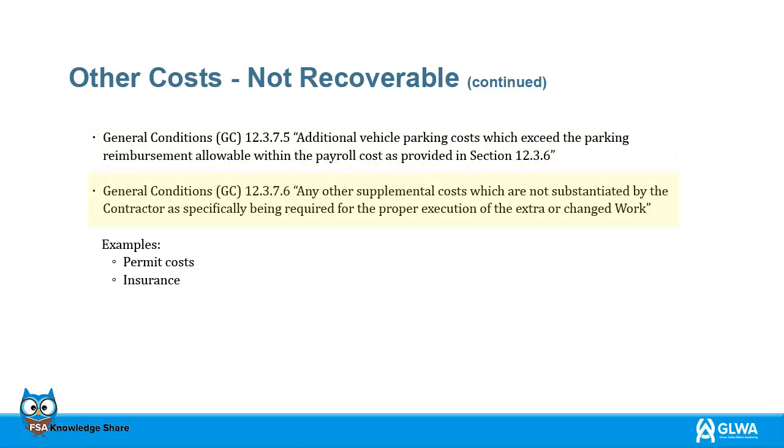General Conditions 12.3.7.6 Any other supplemental costs which are not substantiated by the contractor, as specifically being required for the proper execution of the extra or changed work. Some examples are permit costs and insurance.